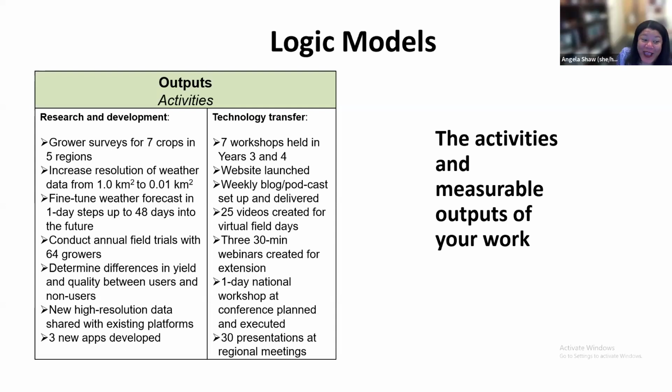And one thing that I would add is when I do integrated grants under USDA, sometimes out of my outputs, I have education, extension, research as my columns. Yes. Because each of those, one thing that they always say with the integrated is they want to make sure that you have equal balance of budget. A lot of times they say one category can't be more than 2/3 of the budget.